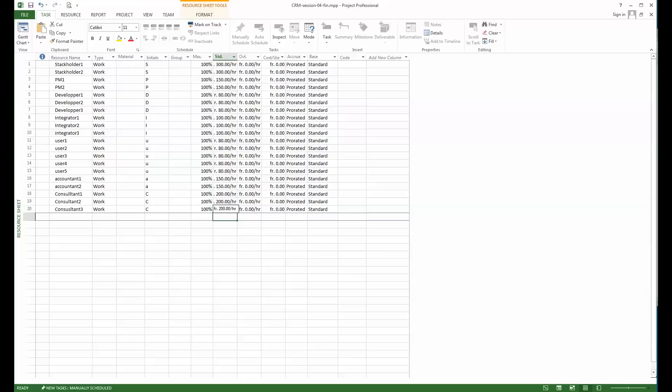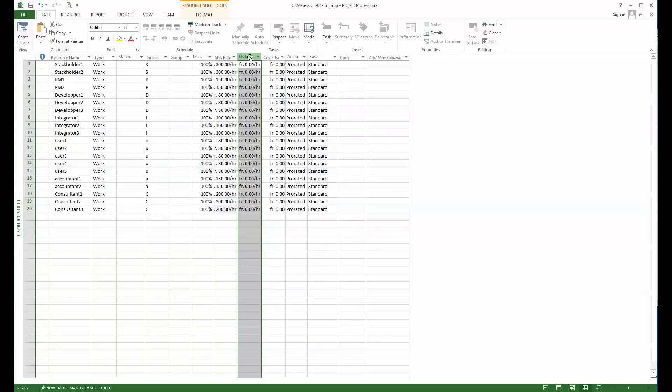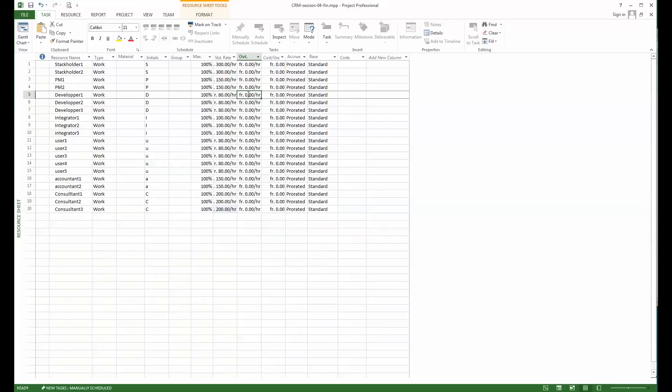As you see, there is a second column here which is the overtime. So if resources are going to do overtime, you can increase the rate or define the same rate. I will do that just for the developers. Their rate, once they are working with additional overtime, will go up to 110 per hour.